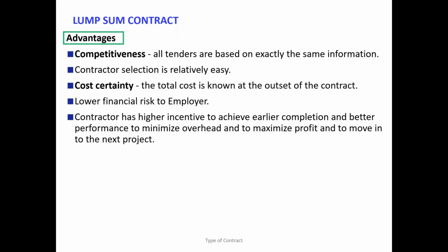Many people are confused between measure and value. When the contractor finishes the work in 11 months, what is the scope of work? Villa or house construction. Is it done? Yes. How much was agreed? The same amount you have to pay him. No argument. Many people in the industry argue on that and unnecessarily go into a dispute, wasting time, money, and breaking relationships, which is useless. So be careful. If the work is done earlier, you still have to pay the full amount.